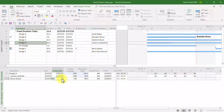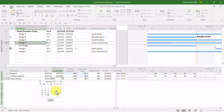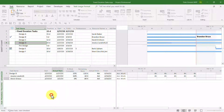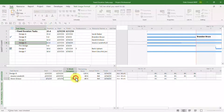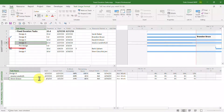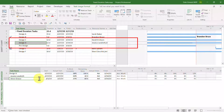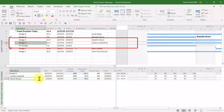Steve, on the other hand, due to commitments in another project, was not able to start on the 27th — he wasn't able to get started until March the 1st. When I select March the 1st for the actual start date for Steve, Microsoft Project once again displays the warning dialog. I'll click OK and put in that Steve only completed 25% of the expected work. Notice that Microsoft Project changed the duration of this fixed duration task from 10 days to 12 days.